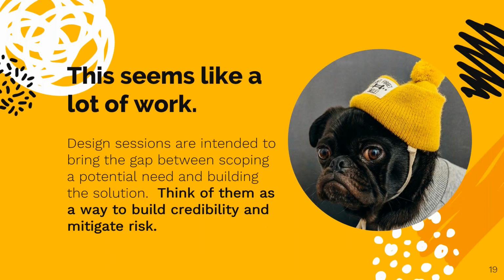So it seems like a lot of work, right? They're intended to bridge the gap between scoping the need and building the solution, but we think of it as a way to build credibility and to mitigate risk. Again, if I can prevent some SME cacophony happening 4 weeks from now by holding a design session up front, I really am able to have a lot more control over the project in general.